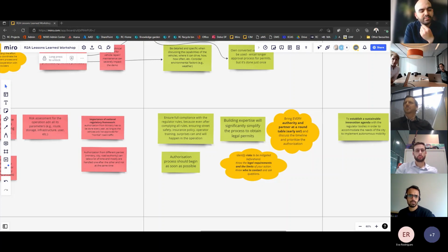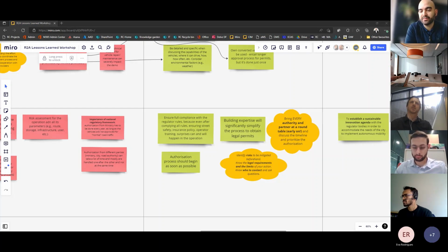Sorry, go ahead, Floris. In Tampere, the provider wasn't able anymore to do the service and maintenance, so they had to do their own repairs. I remember Aki saying that he was going with all kinds of tools below the vehicle to fix everything, duct tape. So I think that's another edge case, but the majority had a service contract in the procurement. Yeah, exactly, and that was also the other message that I highlighted before, regarding the support for technical repairs and maintenance, making sure to have that, because they did have that issue, and of course it entails a lot of effort in-house to repair that vehicle.